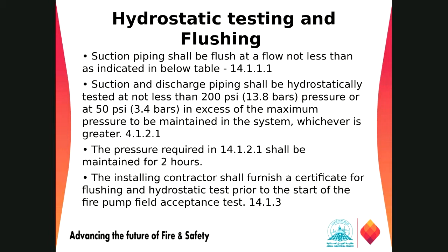The hydrostatic testing requirement and the flushing requirement for the equipment, right, to remove all the obstruction from the piping, the suction and discharge, hydrostatically tested at 200 psi pressure or 50 psi in excess of the maximum pressure to be maintained, whichever is greater, for 2 hours, right? And we have to note down the reading if there is any leakage or any loss of the pressure inside the fire protection system.